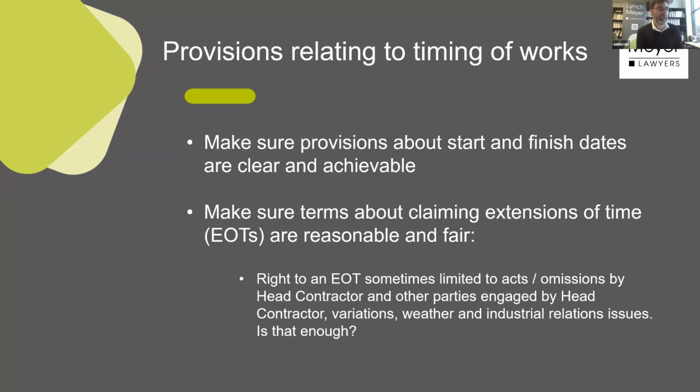Often you'll get something with an EOT extension of time entitlement that covers that. But have a think about whether there's more things that can be put on. I had a builder client who knew that the framing was going to be more determinative by the principal, who had certain connections within the framing industry and was sort of pulling the strings in relation to the framing. So he thought, look, I haven't got as much control over that framing as I normally would. I'm going to build in an extension of time entitlement in relation to the supply of the framing.